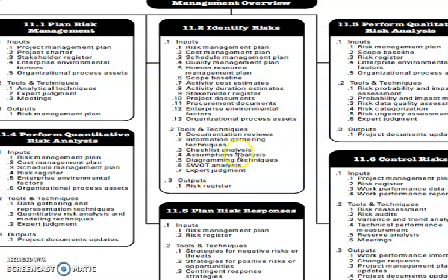Checklist analysis. From this meeting, you have identified some risks and put them in a checklist. You have to analyze that. Checklist analysis has to be done. Then assumptions. We have undertaken the project with a lot of assumptions. So that analysis, whether any assumptions will go wrong, is a risk or not.